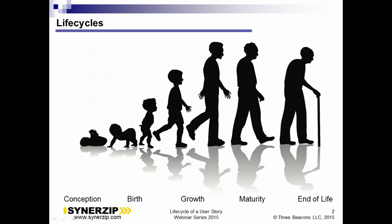User stories are conceived during initial planning as the upfront vision discussion ensues. But also, anytime you're discussing other stories, that often leads to the discovery of a new user story. Looking at a really big user story, often called an epic, and breaking that down can be thought of as conceiving new, perhaps more granular, user stories.